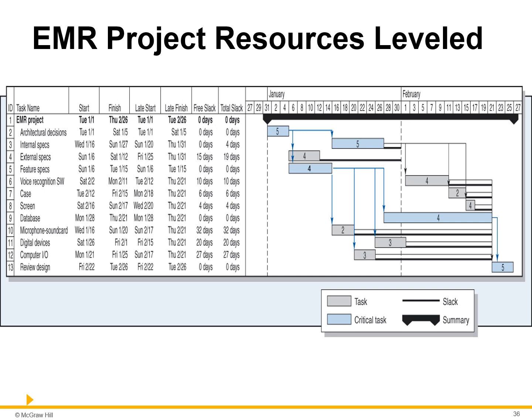The software chooses to schedule activity 5 first because the activity is on the original critical path and has 0 slack, which is heuristic rule 1. Next, and concurrently, activity 4 is chosen over activity 3 because activity 4 has a shorter duration, heuristic rule 2. Internal specs, activity 3, is delayed due to the limitation of 8 design engineers.